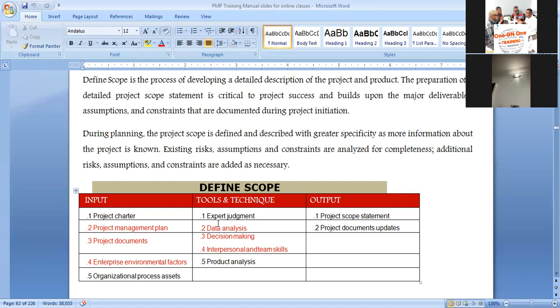What would you do? Go back to time immemorial. Project back 5 years. How much was shipping? It's so and so figure. What is the factor of change? It has had a 200% increase from 5 years ago to today. But in a certain month, it moved with a 20% or 30% increase. Can you see the graph?